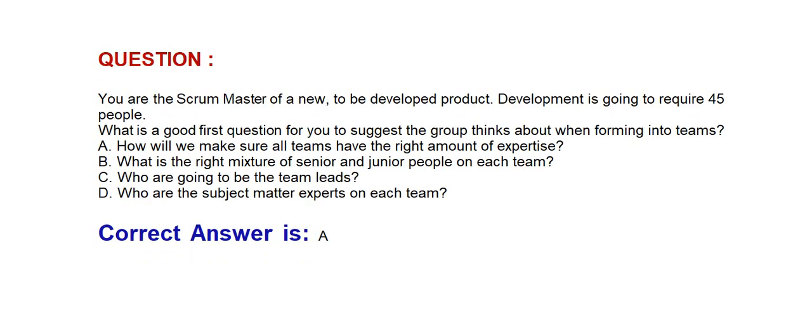Next question: You are the scrum master of a new to-be-developed product. Development is going to require 45 people. What is a good first question for you to suggest the group thinks about when forming into teams? Option A: How will we make sure all teams have the right amount of expertise? Option B: What is the right mixture of senior and junior people on each team? Option C: Who are going to be the team leads? Option D: Who are the subject matter experts on each team? Correct answer is Option A: How will we make sure that all teams have the right amount of expertise?